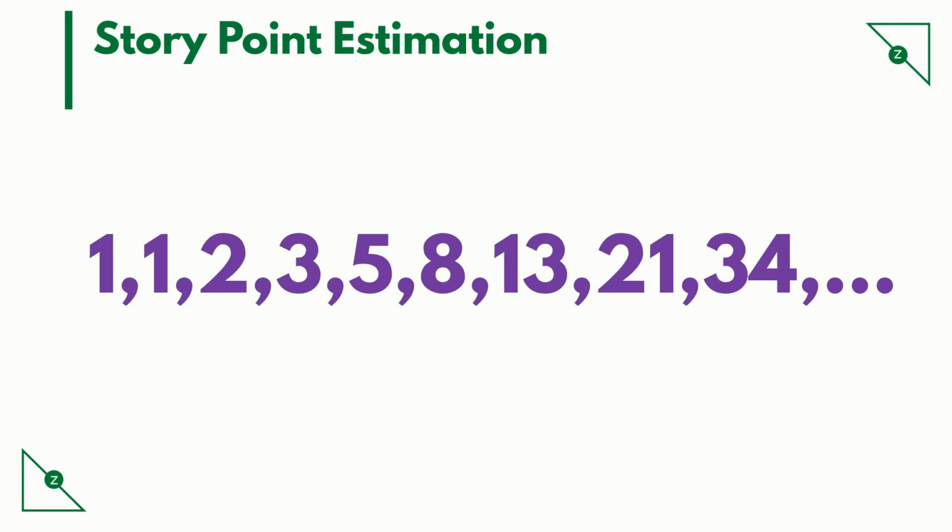As mentioned, story points are estimated in Fibonacci format. Keep in mind that every team tries to split the stories as the estimate gets higher. For example, a Scrum team may have a threshold of 8 story points. If a story is estimated to be 13 story points, it is split into 2 stories functionally, one carrying 8 story points, the other carrying 5 story points.